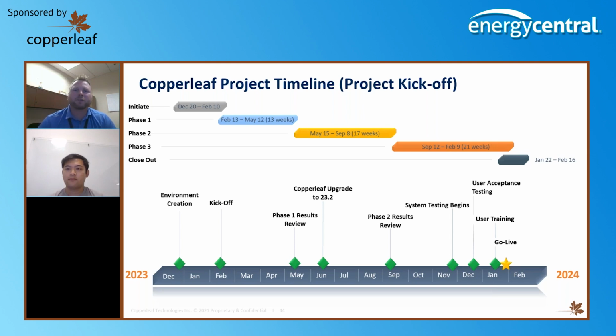Then we added 3 additional asset families in phase 2, and we turned on the intelligent bundling capabilities. We started talking about how you want to bundle. Do you want to bundle by functional equipment group, by substation? What makes sense there? And then we added the remaining asset families, and then all the details around the substation, the substation level data that's not necessarily categorized in an asset family: control cable age, condition, erosion issues, and other things that allowed us to then move into making those full hybrid and asset specific replacement stations.